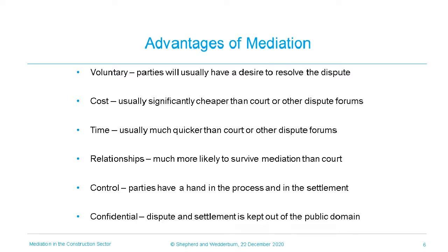Mediations themselves are conducted under confidentiality agreements, meaning that discussions can be open and are entirely on a without prejudice basis. If the mediation does not conclude in a settlement, both parties can leave without the mediation affecting their position in any formal process. If a settlement is reached, then the terms of settlement will also be confidential. It is likely that all parties will see the benefit of keeping the dispute and settlement out of the public domain, especially in situations where the dispute is commercially sensitive or controversial.